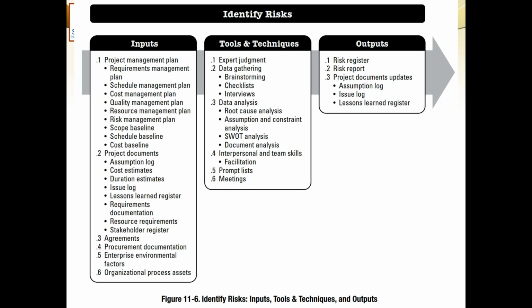So all the risks you have captured so far will be registered in a risk register, which is a kind of a long list of risks, and you keep entering each risk in that kind of table, naturally with certain attributes for that risk. Maybe what is the name of the risk, who gave you this risk, and what department that person was from, and who is the risk owner, and what could be the probable response for this risk, what is the probability of happening. As much data as you can collect. I'm not asking you to fill all the attributes for each risk. Whatever attributes can be known may be filled right at the source. Otherwise, just the name of the risk is enough. And if the name of the risk is in proper cause risk effect format, that is fantastic.